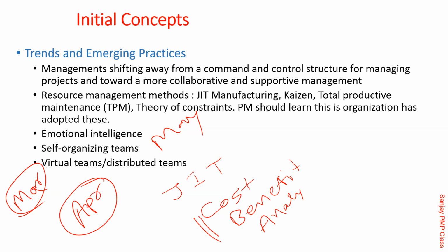There is a third option: go ahead and do a contract with them. Do the contract, do the upfront payment, and say, I will give you the money, you send the material only in the month of May. I mean, all those cost benefits, you'll have to work out. So when we are saying JIT, it does not mean that stocking something is wrong as well. Correct, Kiran? Okay, got it.